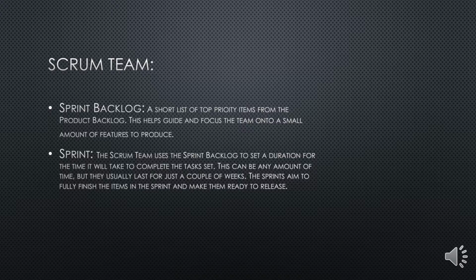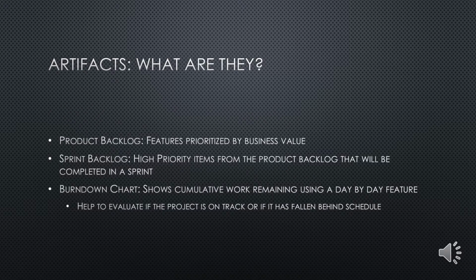This mirrors that of a product backlog, where it takes the highest priority of the list and puts the most effort and time into the respected items. Sprints can repeat as many times as it takes to complete the entire project. They are also a very useful tool to see if the project is falling behind schedule, because if sprints are losing time, that means the entire project will most likely be late. The Scrum Master can then make adjustments to the schedule to correct this late issue.